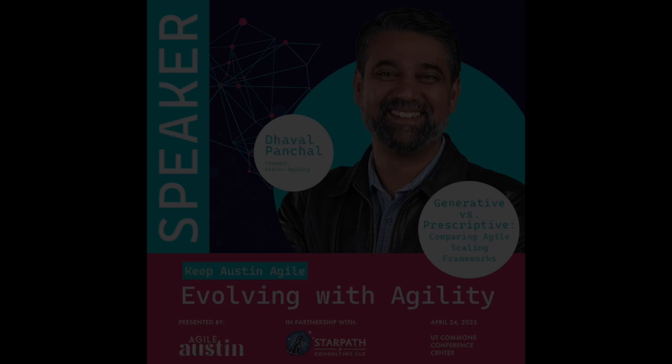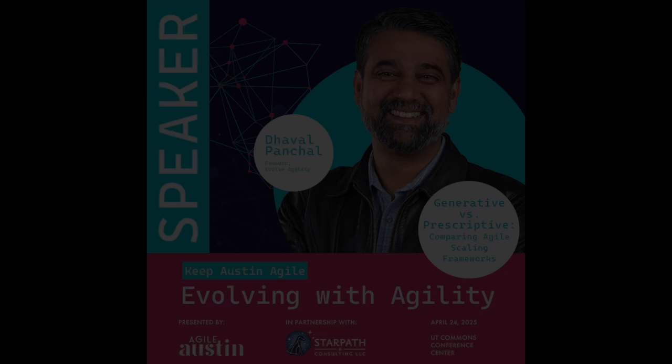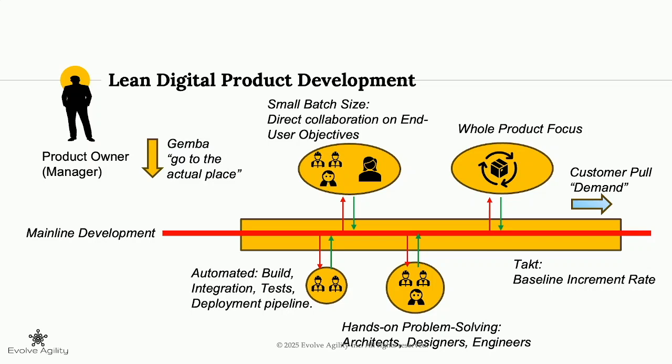A simple heuristic: look at your build. If your build was previously working 3 months ago, you are at minimum 3 months away from releasing the product in any shape or form. Don't trust any other metric, because you have accumulated at minimum 3 months' worth of quality issues that will be non-trivial to resolve. Therefore, you must always keep your build running. When it fails, the first response has to be to go to the reason why the build failed, not to send a report about why the build failed, but to actually fix the reason why the build has failed.